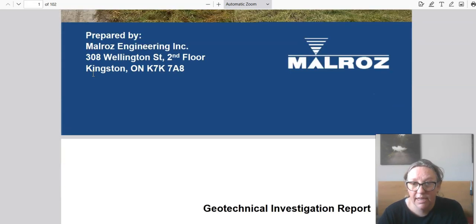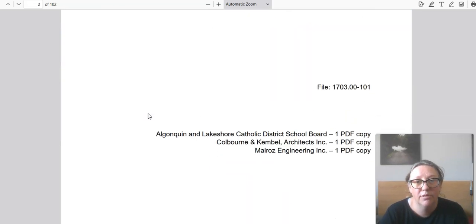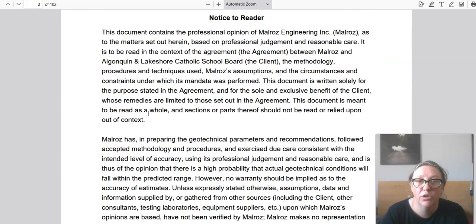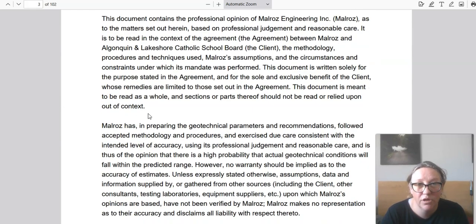So a geotechnical investigation, if it is included in a bid document, you always want to have a look at that. You always want to do it as part of your bid analysis before you start doing your estimating, because it will tell you a lot about what the subsurface conditions are. And if the subsurface conditions are not great, then you will know that you need to either make allowances for those pumps or for coring, or if there's a very high water table, maybe suggest to the customer that they do screw piles or pounded post or something like that instead.